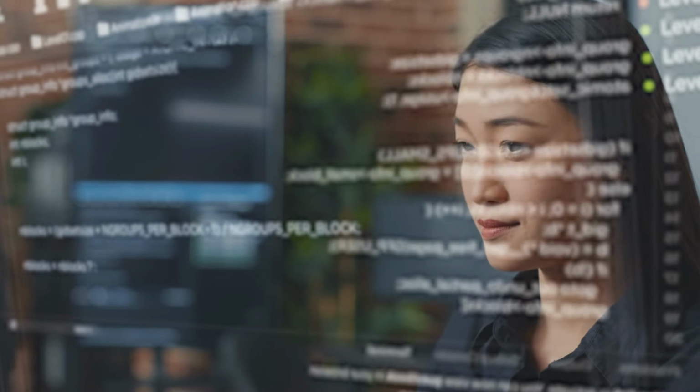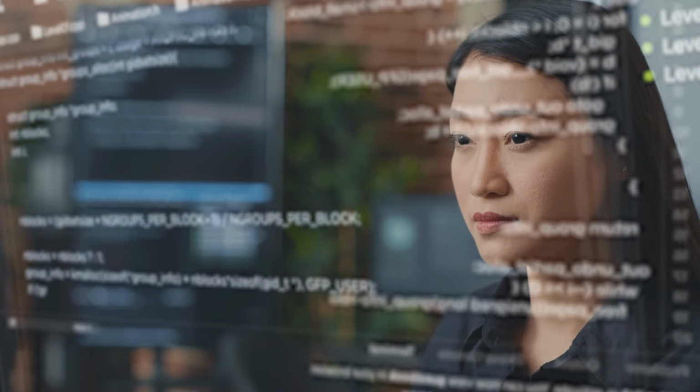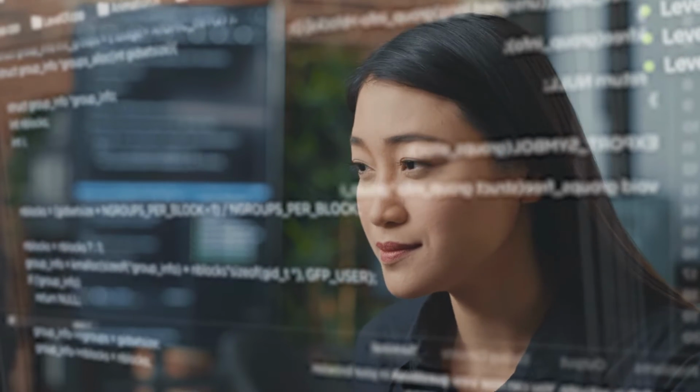This will be your database of costs, and that'll go into your estimating software so that when you pull through your labor rates for interior finishing, or maybe plumbing, maybe you've got your journeyman, or your Red Seal or whatever, you're going to have different labor rates. So that all should be pulled through from a solid database of costs so that you can fluctuate those costs and it pulls into your estimate whenever prices change, which they do.